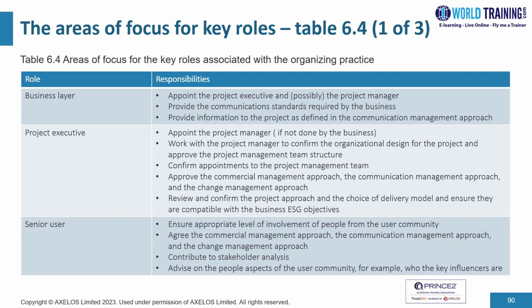In terms of the executive, the responsibility of the executive would include appointing the project manager, if not done by the business, working with the project manager to confirm the organizational design for the project and approve the project management team structure, confirm appointments to the project management team, approve the commercial management approach, the comms management approach, and the change management approach. The executive would review and confirm the project approach and the choice of delivery model and ensure they are compatible with the business ESG objectives.